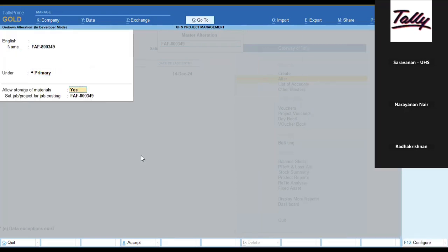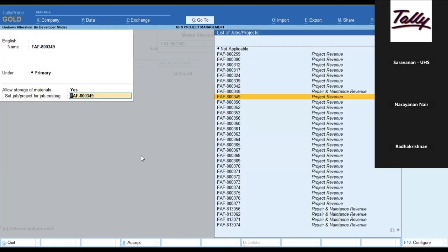Here we also map it with the projects. So inventory and project financials are interlinked based on this. Whenever we create a project on the cost side, we will also create the location and map it with the particular project, to make sure that inventory is passing to that particular location itself for reporting as well as for stock maintenance.